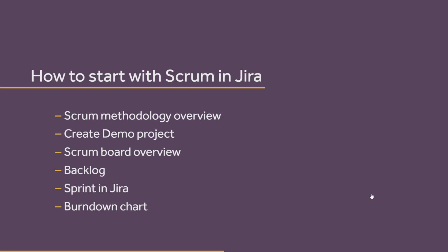Like we've got basically a project, a web development, and we will be progressing in Scrum by stages, and those stages are sprints. Ideally, I can't really tell you the optimum length of a sprint, but I'm recommending between 5 to 10 days. So that's the main difference. We're working towards the deadline in Scrum.